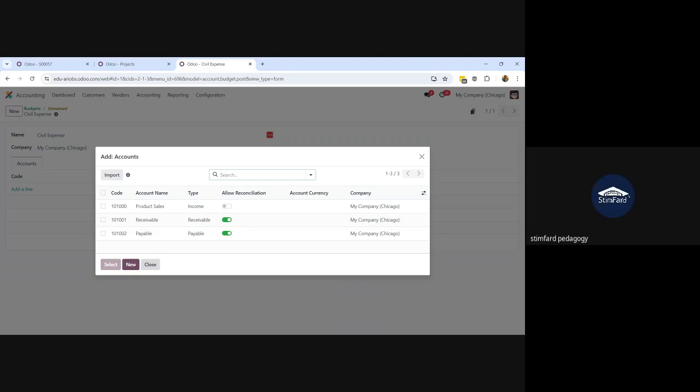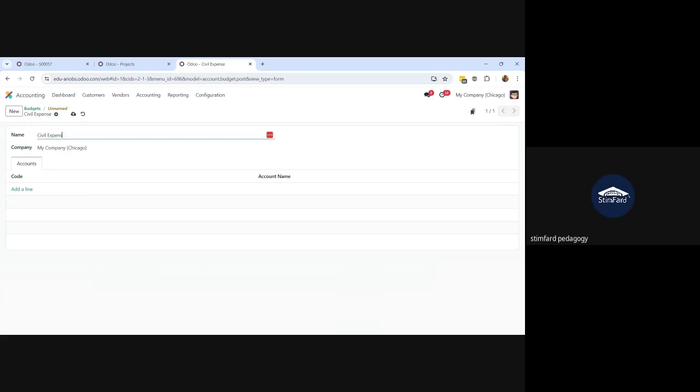For that cost, you can create the budget on the project, what your cost will be according to your budget. And then after incurring the actual cost, you will be able to monitor which costs of your project have gone up and which cost is lower than your budget, and you can monitor and control for your future projects. Is it making sense?